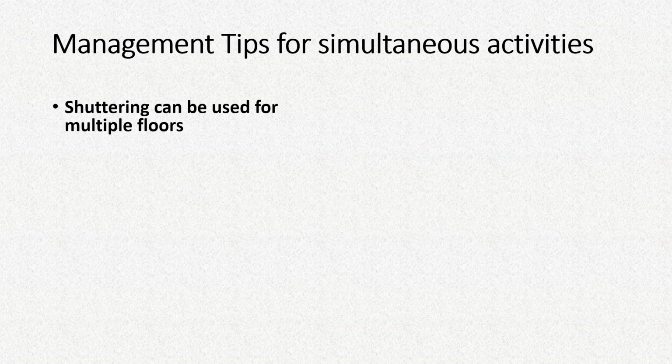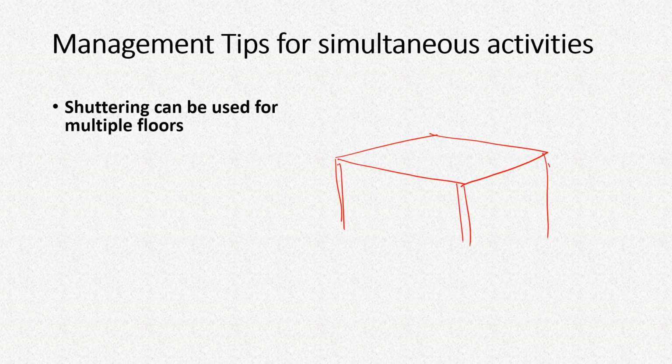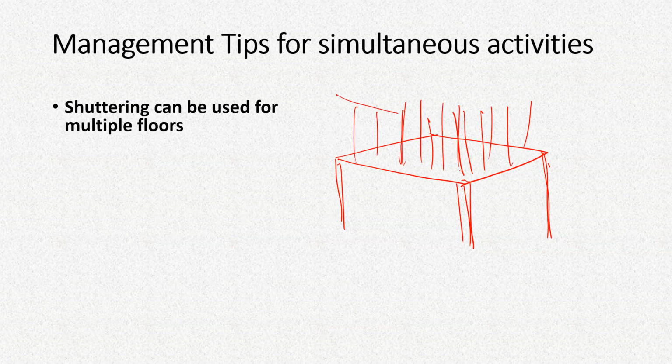When you bring shuttering boards and poles and columns for one slab, suppose the first floor slab, after it is removed, suppose after 21 or 28 days, then you can immediately start shuttering for the next floor, and on that floor you use the same shuttering boards and poles, etc. In that case you don't have to bear the transportation cost, because the vendor who provided the shuttering will otherwise have to take it back, then again provide it to you after some days.